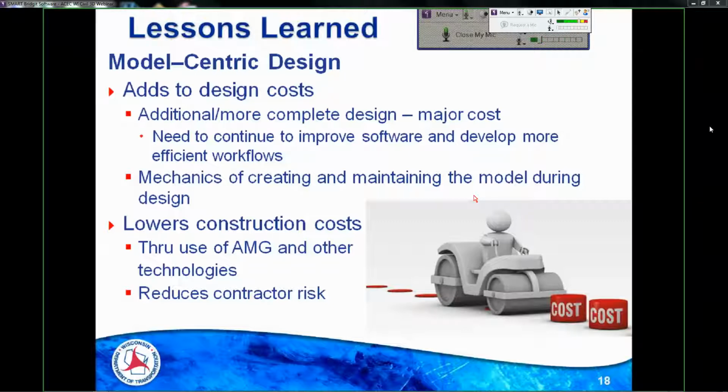Every contractor, when you boil down everything, when they're putting together bids, what they're really doing is assessing risk. And they're finding their own solution for how to mitigate that risk. And using this design model data that we deliver, there is a possibility that it won't match plan information, right? We do as much as we can as designers, and we did as much as we could in putting the workflow together to help ensure that the two are synchronized.